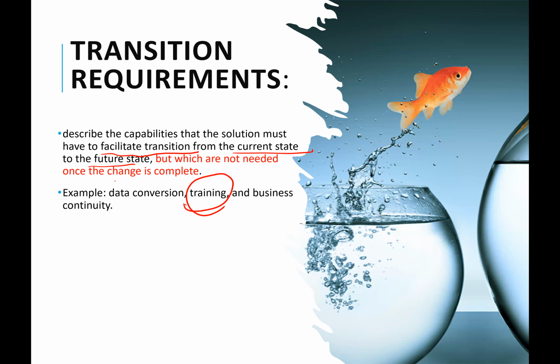Sometimes it may be data conversion, right? Where you have developed a new solution. The previous solution had data stored in a particular way, right? And now you need to convert that data to a format or to the specifications of the new solution, right? So that's a transition requirement.